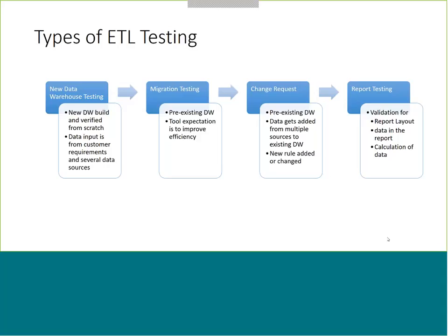Migration testing, as I talk about, change requests. Now, change requests are massive. I think we've got one customer where, when they get a single requirement change, it takes them all day to go through all of their existing test cases by hand to see if any of them need to be changed, updated, removed, or if new test cases need to be added. Now, that's for a single requirement. So how many requirements do they have? Hundreds. So they've got an army of people checking existing test cases. This does not scale. It's not something you can roll out in any systematic way and at speed.